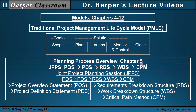In the planning process overview, Chapter 5, he starts with a joint project planning session (JPPS), and from the project overview statement (POS), he identifies something called the project definition statement, which describes the POS from the perspective of the project team — sufficient for the team to understand the project enough to begin planning. Then with the requirements breakdown structure, they begin defining the work breakdown structure and the critical path in the CPM, which is the time schedule.